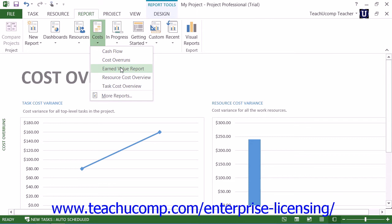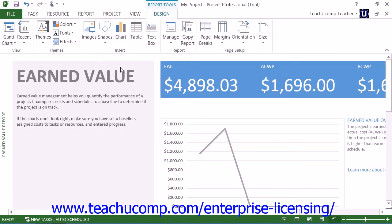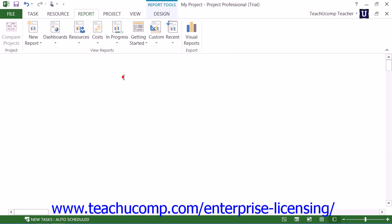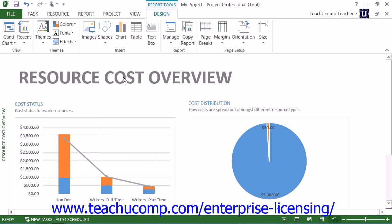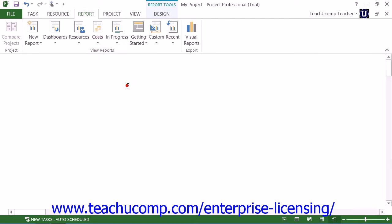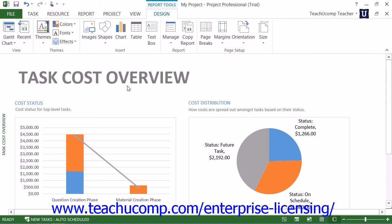You also have the Earned Value report, which shows the earned value, variance, and performance indicators over time by comparing costs and schedules. This report is used to determine if your project is on track when compared to a selected baseline. The Resource Cost Overview report shows the cost status of work resources and material resources, displaying cost details in a table and cost distribution in a chart. The Task Cost Overview report shows the cost status of top-level tasks, with cost details in a table and cost distribution in a chart.